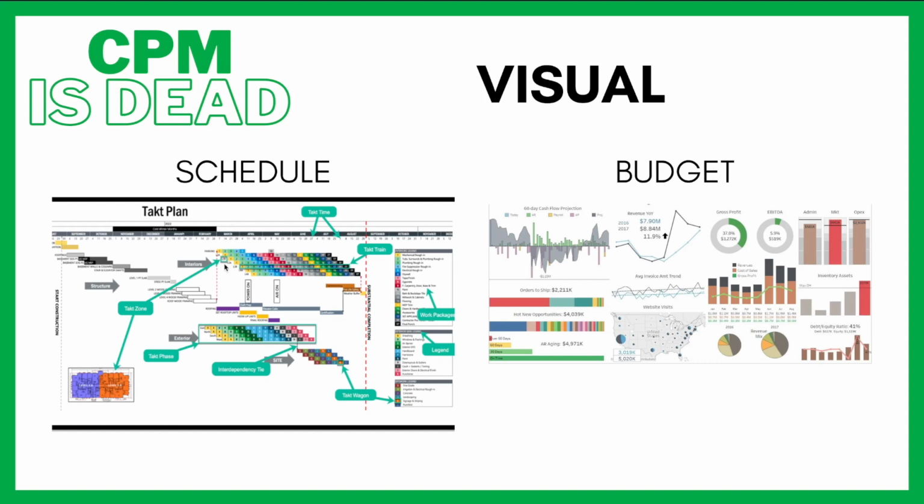And so we can see, okay, I can see that our structure is what's kicking off interiors, and that's how we get all the way to the end date. So if anything happens here in foundations, that's going to be a problem, because that goes all the way out to linking here and pushes us all the way out to the end. So I can see that correlation. If anything happens in the structures, it's going to affect the interiors.